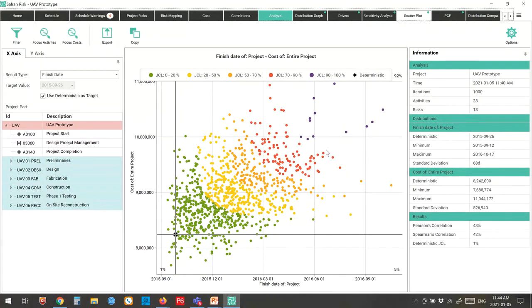So for what you can see here, and it might be a little hard to see when I'm doing it on a webinar, what you can see is we change from being the orange colored band to the red colored band at our P70. So if I want a P70 joint confidence level, I can choose anything on this first row of red dots.